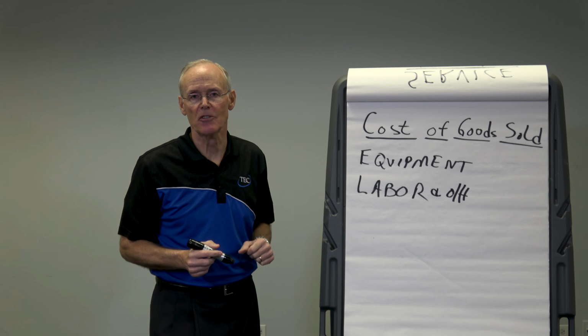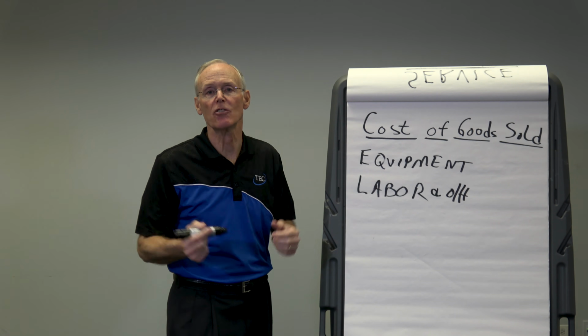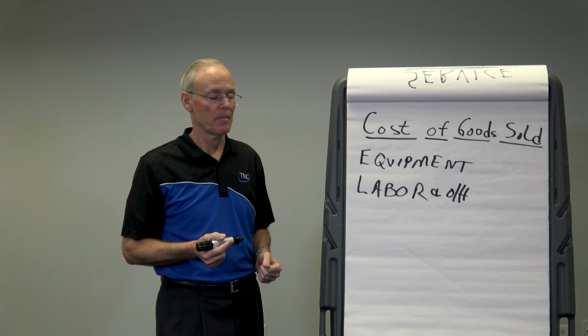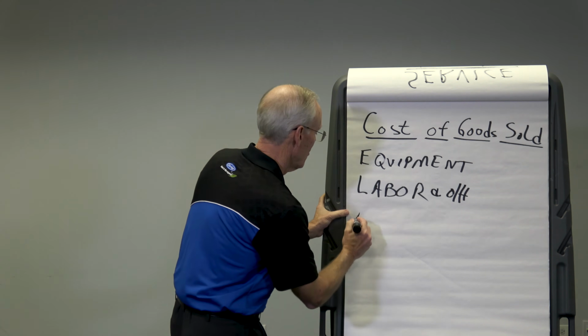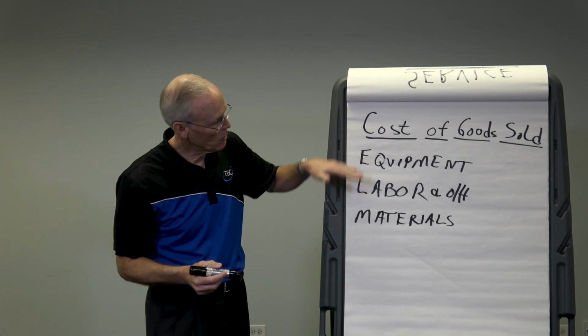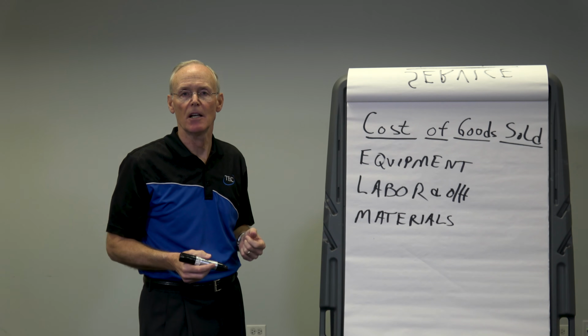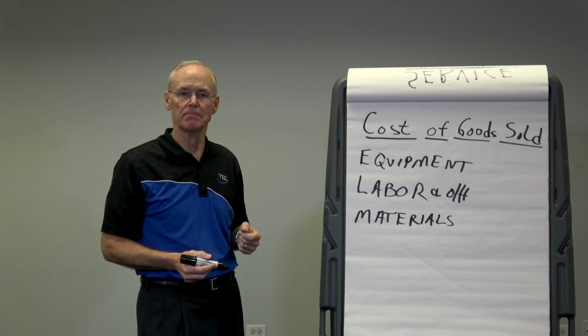What are some other things in your estimate? Or what are some other things that are there because you got the job? What about all the materials like the sheet metal and the electrical wire and stuff like that? Okay, so that's part of equipment and materials, but it could be all the accessories that you have, the thermostats, the sheet metal, the whips, things like that.